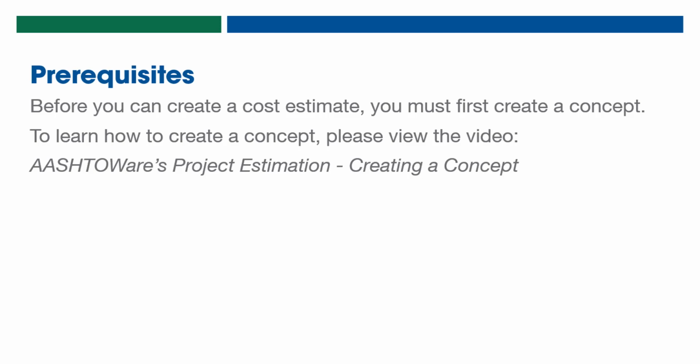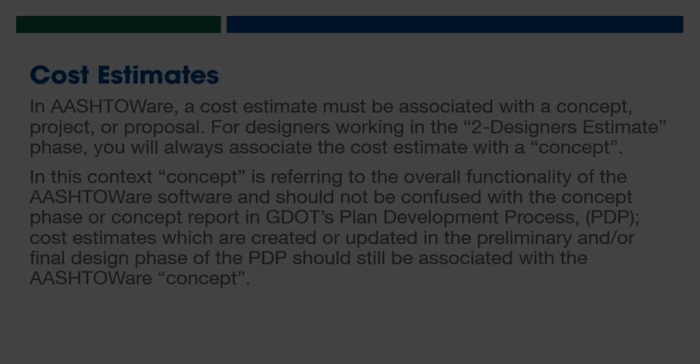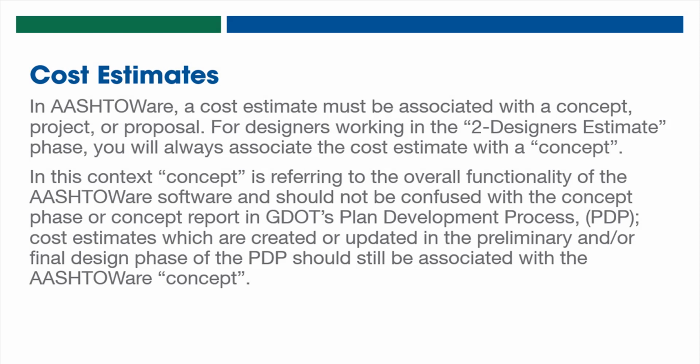Prerequisites. Before you can create a cost estimate, you must first create a concept. To learn how to create a concept, please view the video AASHTOWare's project estimation, creating a concept. In AASHTOWare, a cost estimate must be associated with a concept, project, or proposal. For designers working in the To Designers estimate phase, you will always associate the cost estimate with a concept.